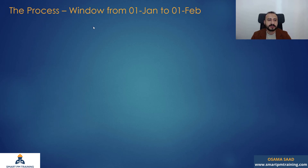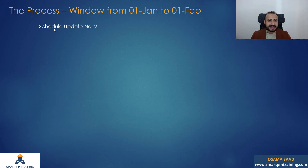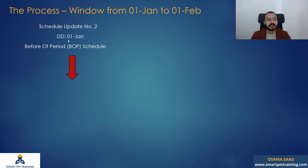Here is one example. I'm going to show you the process of one window. The start will be 1st of January and the end of the window is 1st of February. So that's my schedule at the beginning of the window — it is schedule update number two, with data date 1st of January, and it is called the before-of-period schedule.